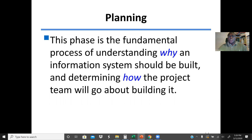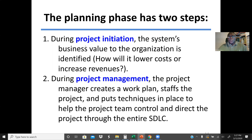The first phase is planning. This is the fundamental process of understanding why an information system should be built and determining how the project will go about building it. The planning phase covers why and how. Why do we need a system? Is it more feasible to automate the operation than doing it manually? In this planning phase we also do what we call a feasibility analysis. The planning phase has two steps: project initiation — where the system's business value to the organization is identified, such as how it will lower cost or increase revenue — and also we do our feasibility analysis.